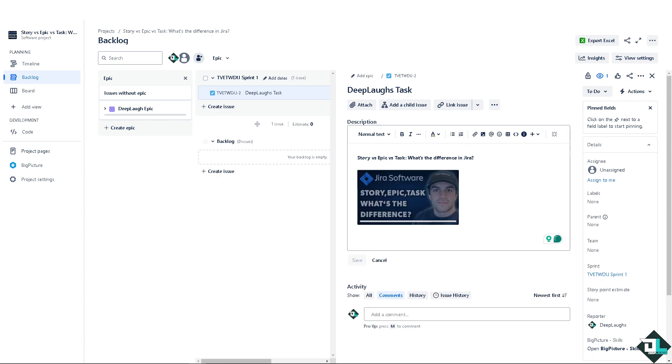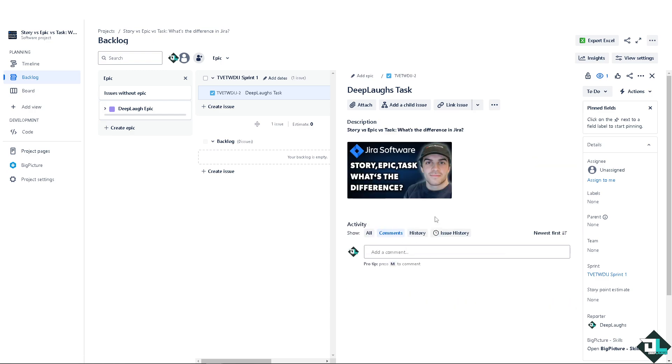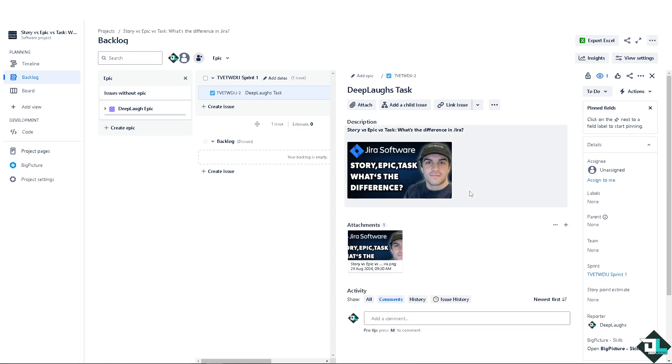Tasks are similar to stories but may not deliver user-facing value on their own, because they often involve backend work, configuration, or other activities required to support a feature. I normally use tasks for work that supports a story or epic but may not represent a feature by itself. For example, a task under the work in progress epic could be something like needs to be checked.